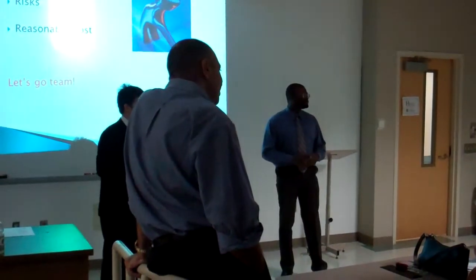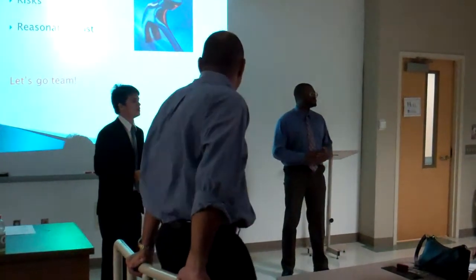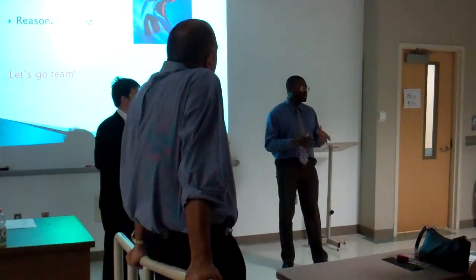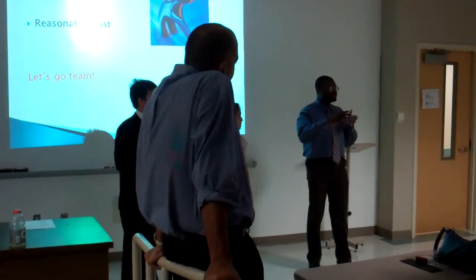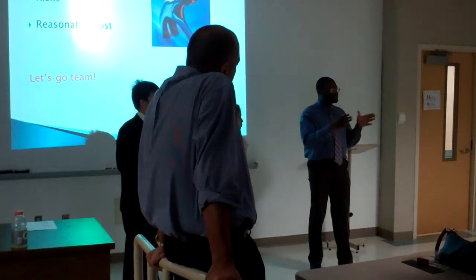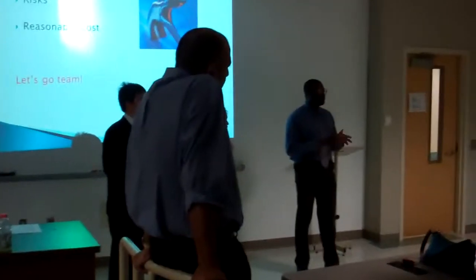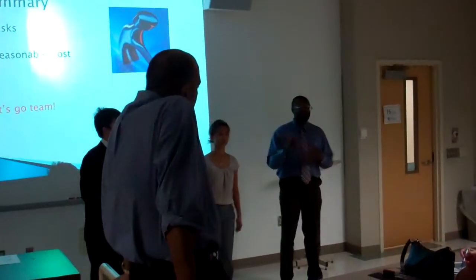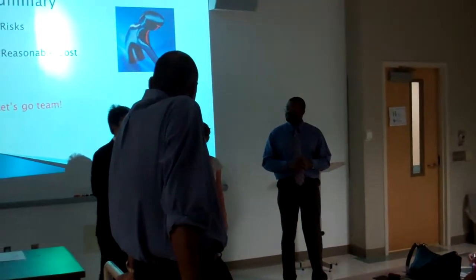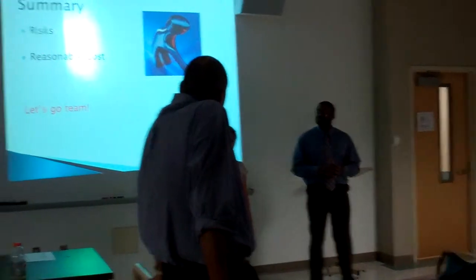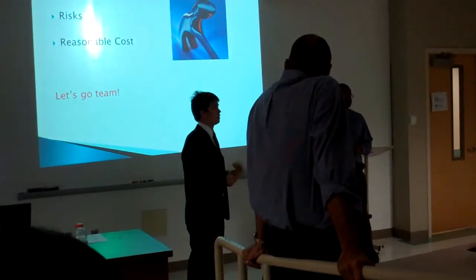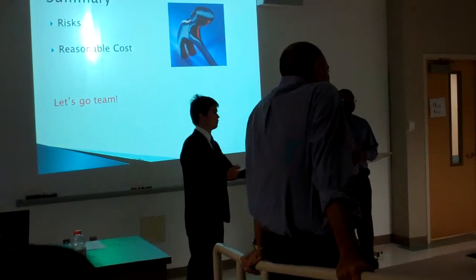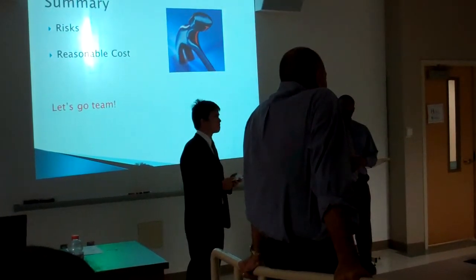Did your 36,000 include the contingency? Yes, there's a buffer amount included in that 36,000. We came in underneath that, so we think that the contingency gives us some flex from that. About $5,000. $5,100. Oh, also the good part, I didn't mention this earlier, but the $5,100, if it's unused, and we have to provide supporting documentation if we do actually use those costs. If it's unused, we will write you a check that day, and we'll give it back to you. So that's actually a good deal. Your risk estimate was 31,000 or 5,000? Yes.